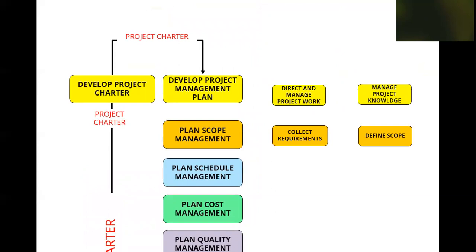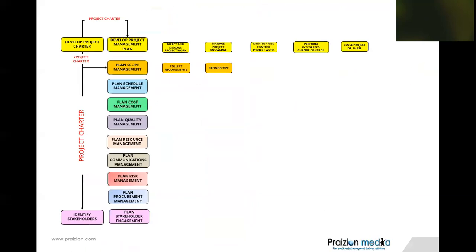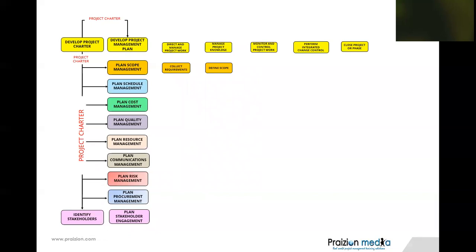But that's not all. I would also like to point out to you other important places that the Project Charter goes to. The Project Charter is an input to Plan Scope Management, Plan Schedule Management, Plan Cost Management, and Plan Quality Management. And anywhere you've got Plan X Management, like Plan Resource Management, Plan Communications Management, Plan Risk Management, Plan Procurement Management, and even Plan Stakeholder Engagement, you see the Project Charter go into those places.